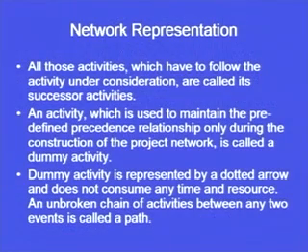So, we will see what a dummy activity is and where it is very useful. I will explain this with the help of an example when we see the rules for drawing the network. But till now we can easily understand this point: a dummy activity is an activity which does not require any time and resources, and it is incorporated in drawing the project network in order to satisfy the logic or the precedence relationships among the various activities. A dummy activity is represented by a dotted arrow and does not consume any time and resource, which I have already explained.